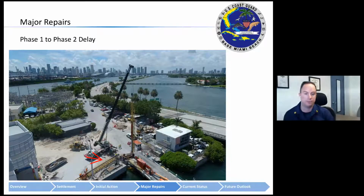Additionally, in light of all the numerous competing land uses at the time of this project, a barge crane could have been considered. Although notably more expensive, the time saved in development and execution of the project may have adequately offset the increase in price. Although, depending on the barge type, if it needed to spud down based on the benthic survey we had, I don't know that that would have been feasible.